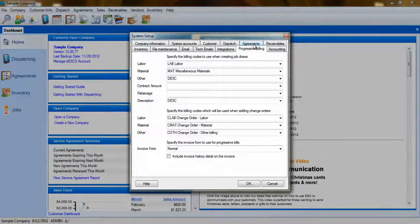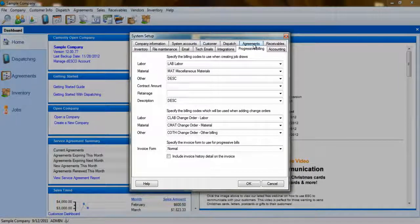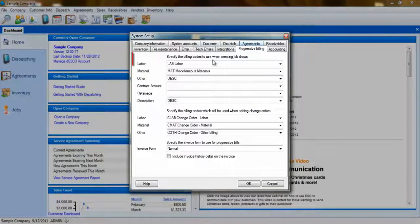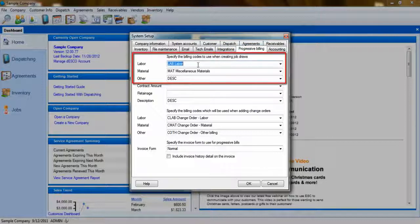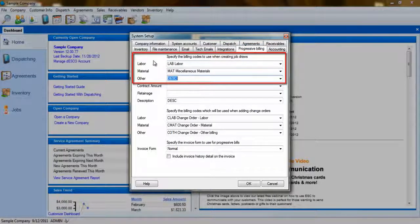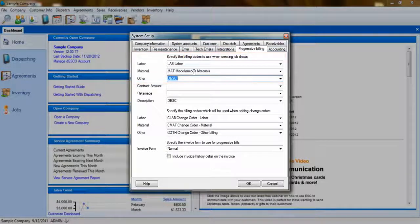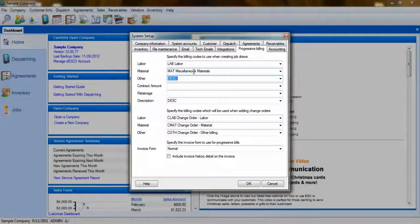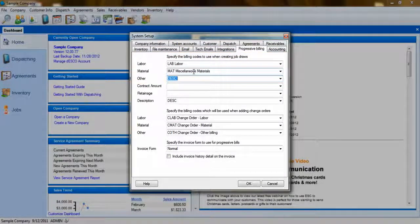When Progressive Billing invoices are created, the items used on the quote are grouped by their type into a single billing code. You'll need to choose which billing codes will be used to represent those groups, such as labor, material, and other.